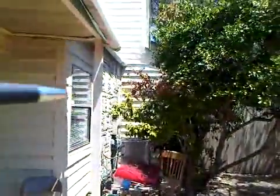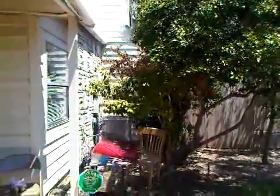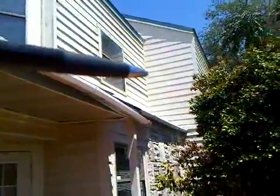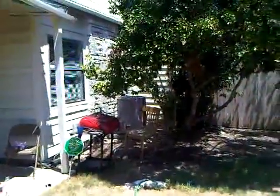Basically this wall that I'm facing right now, you can see the seam right at this point where this is all Hardie. This was done as the other unit's project. So from this point down is where our starting line will be, and then up in this corner, this is all Hardie. This is our starting point right here. So that will be all Hardie all the way around the top, including any fascia repair, and then ultimately all fascia paint. So that's basically what we're looking at in the back here in terms of our scope of work.